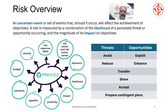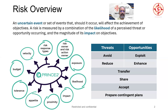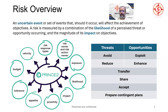To calculate the risk score, I multiply the probability of occurrence by the impact — whether 100% or only 10% of my project objectives will be impacted. These two critical factors — likelihood and impact — are also driven by many other aspects of risk.